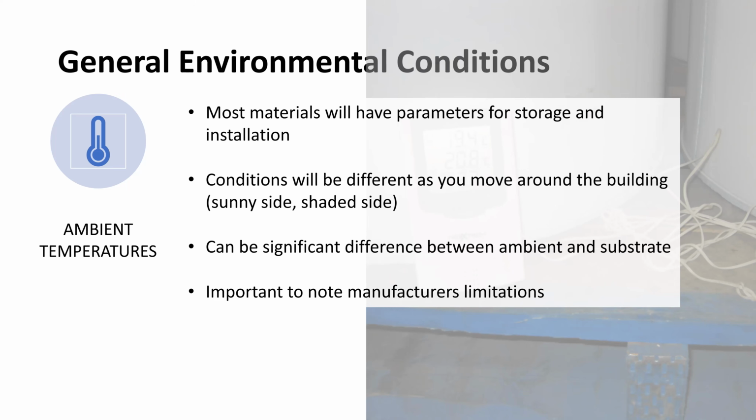So sometimes a contractor may have to switch materials even throughout the project, say in the spring and fall, where it's hot and cold, and at night it gets cold, but it's warmer during the day. And you have those fluctuations, okay? So all these materials are going to have a high end and low end. Now, as we go around the building, we're going to find that there are different temperature conditions around the building.